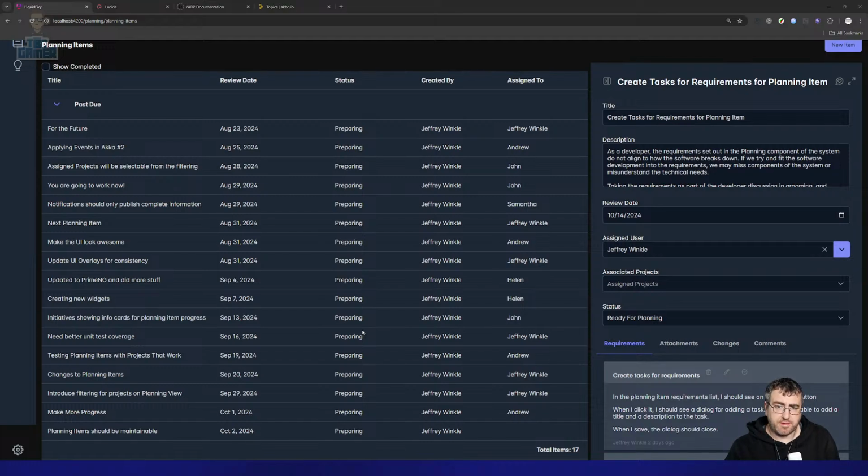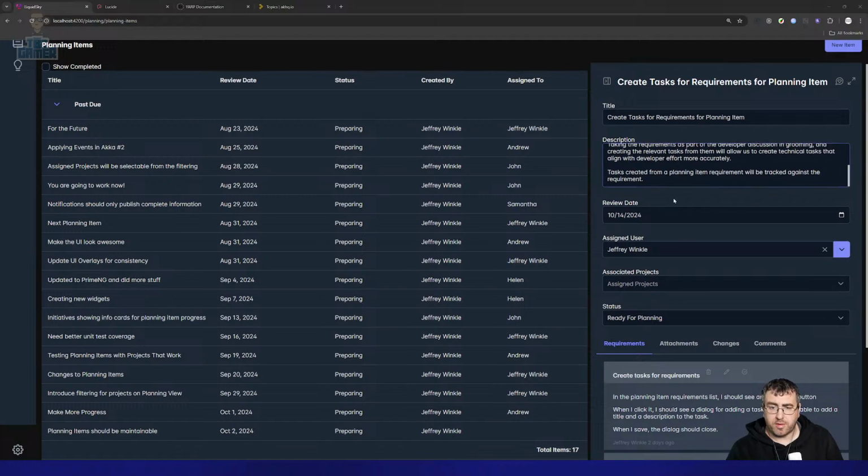So you lay this out as: this is a piece that I think would add value to the system, and this is the way I think it should work. This is essentially our story in Jira, because the number of times I've gone through this with the product side and they've said, here's what I want, and you're like, well, that's like 8 stories. I want them to be able to describe that, and we can still break these up, but more on their terms and less on ours as developers.